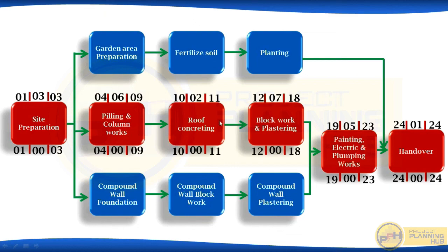All projects will have a critical path. When we execute a project, we will give high priority to these critical path activities. Delay in any critical path activity will delay the project. When we use Primavera, there is no need for calculating all these. We only need to provide duration, relationships and the project start date. Then Primavera will calculate early start, early finish, late start, late finish and float.